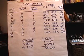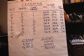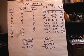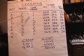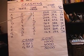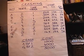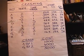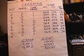Let's say we've got information about each activity. The normal times that we had before are listed here. It's possible to crash down to one day on activity A — so we can crash it from two down to one day. Likewise, on activity B, we can crash it from three days down to one day. Activity C we can crash from two to one, D from four to three, E from four to two, and so on.